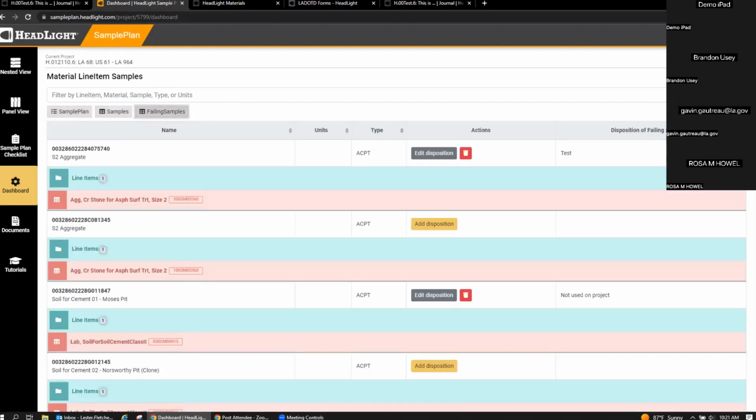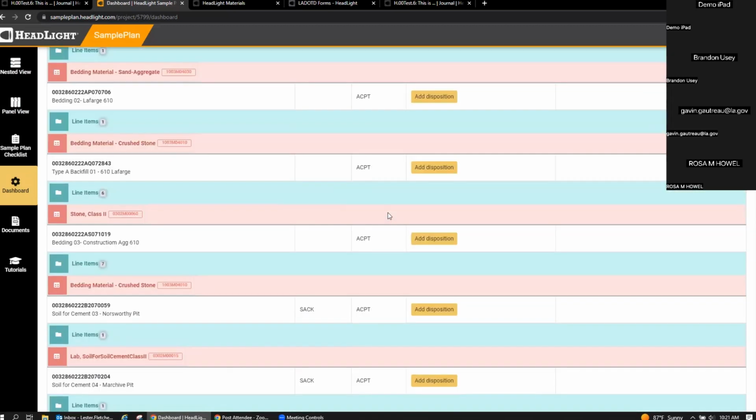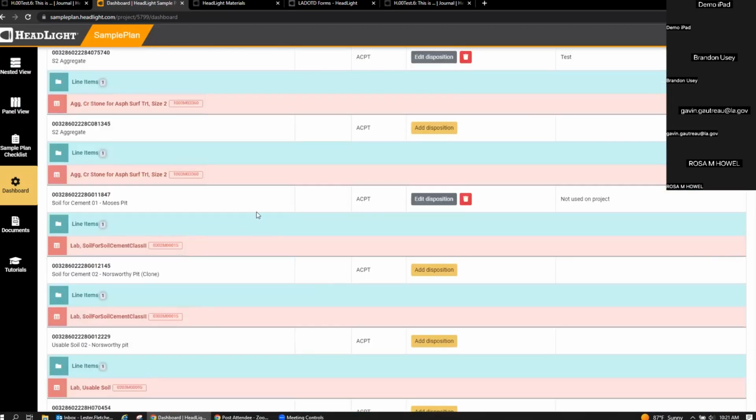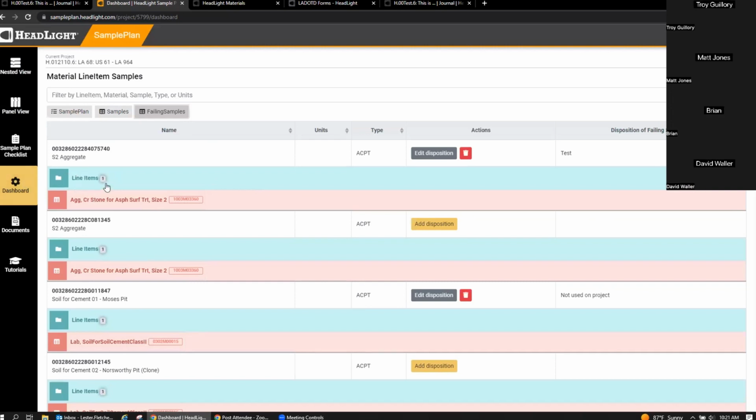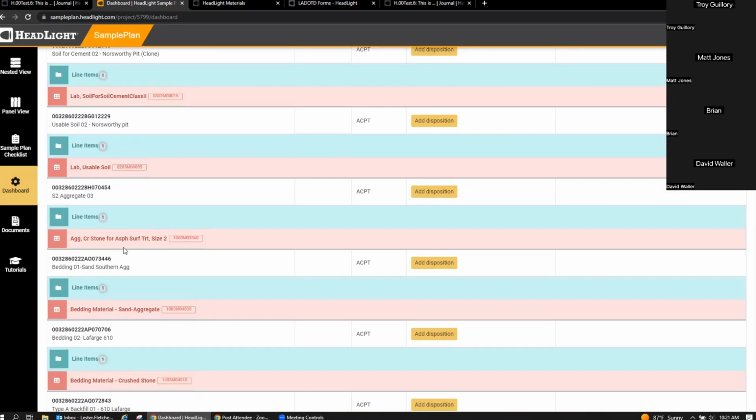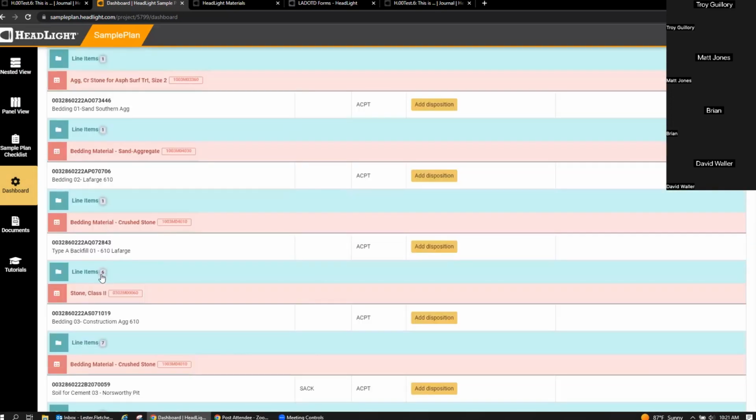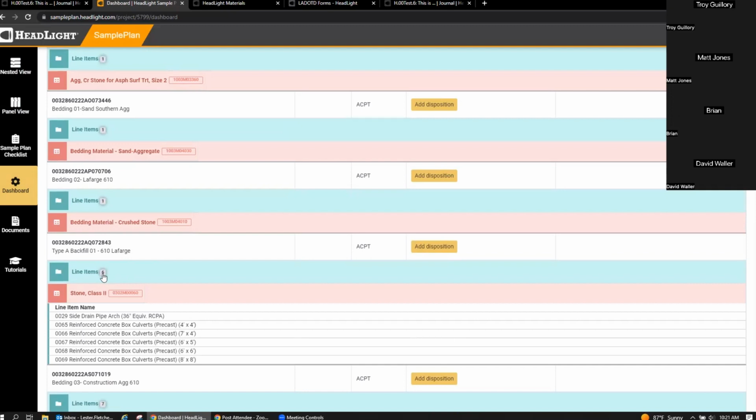So what happens is when you, let me get this off my screen. So when you do the failing samples, it gives you a list of all your failing samples in materials for the project. And like I said before, this used to be itemized by, I believe, the line item. Line item's still there. If you notice this little 1 beside it, that represents how many line items are actually tied to the sample. This is a good example. This one has 6. And so if you click on that, it'll actually display all of the line items that this type A backfill is attached to in that sample.